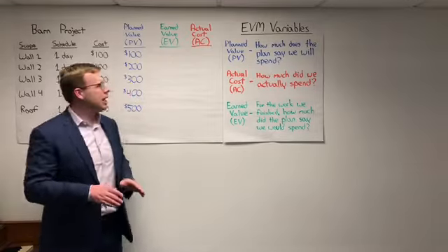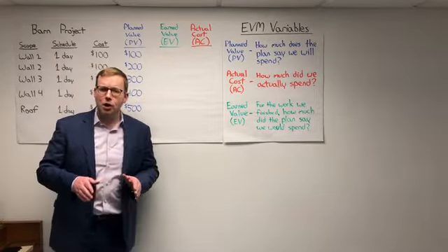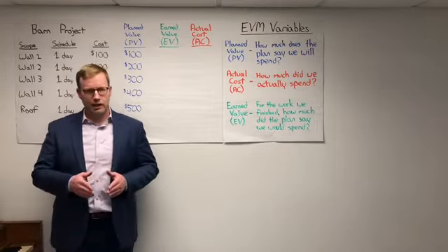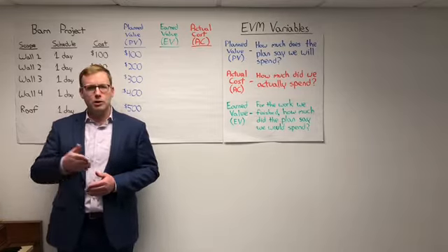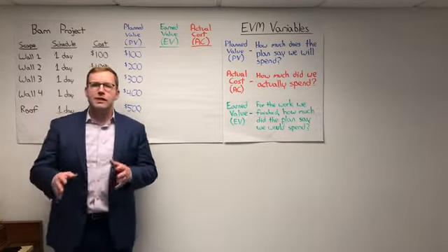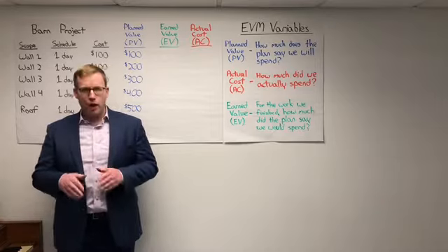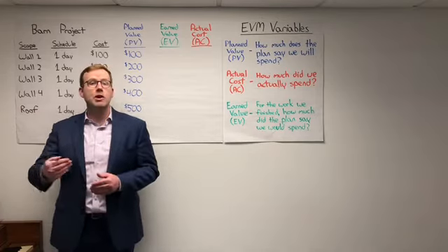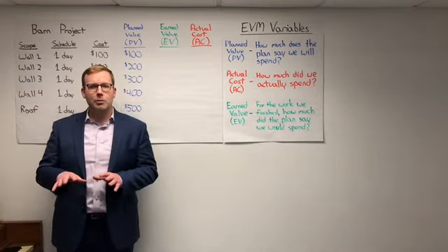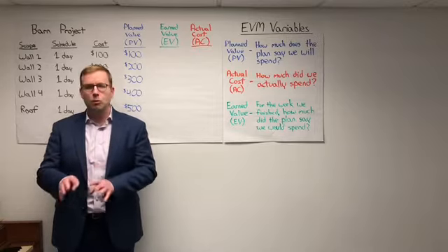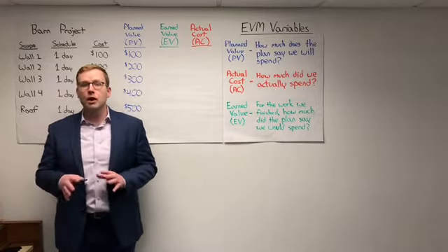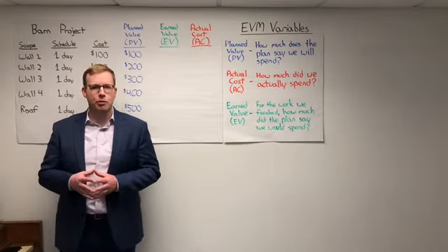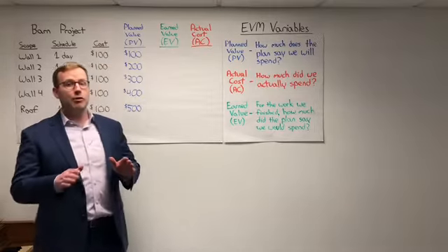Today's topic, we're going to be taking a look at earned value management. So, what is earned value management? Earned value management is a performance measurement technique that helps us evaluate how we are doing on our project from both a cost and schedule standpoint. It also helps to communicate and normalize this data in a way that allows us to communicate with our project stakeholders and have them compare different projects and programs, different work packages or control accounts within a project or program, and compare these activities apples to apples in terms of their performance. And earned value management is a very, very big topic.